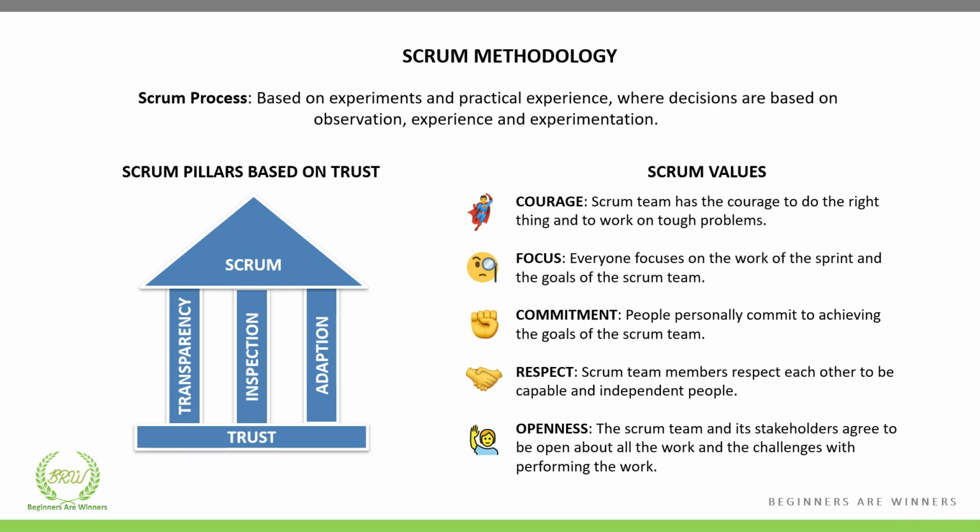All the observations during the development phase, feedback from the demo, and inputs from the team are discussed during the sprint retrospective meeting, which is done on the last day of the sprint after the demo. During the sprint retrospective, the project team sits together and reflects on their performance and identifies potential improvements in their processes and practices.